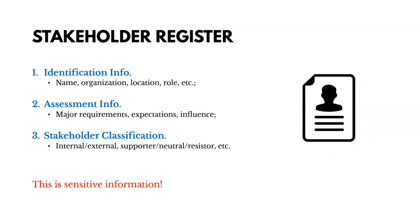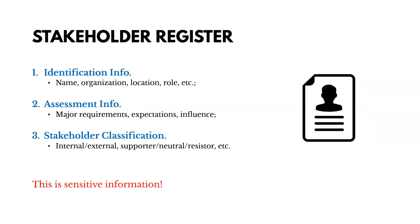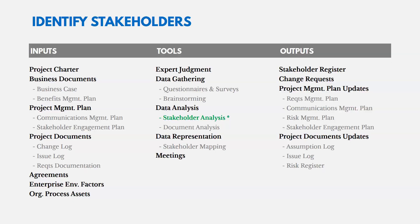The stakeholder register is the key output. It includes basic identification information — name, organization, location, role, etc. — as well as assessment information like major requirements, expectations, and how they could influence things. It also includes stakeholder classification: are they internal or external, a supporter, neutral, or a resistor? It can also include information from classification models like the power interest grid and the salience model.